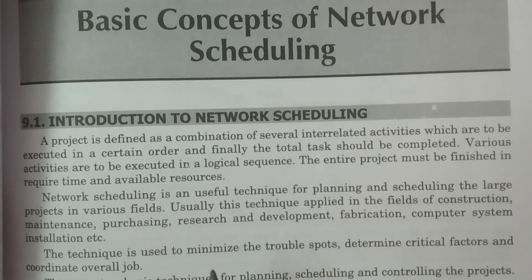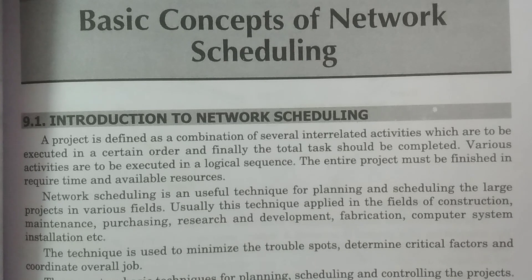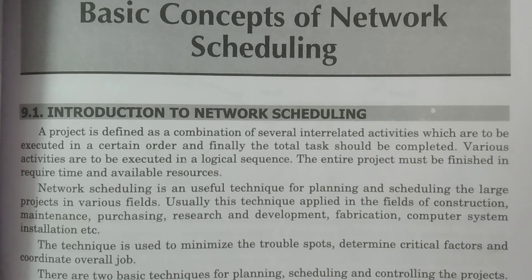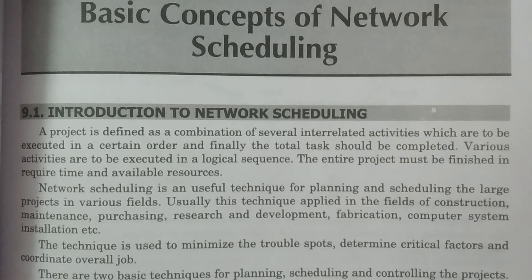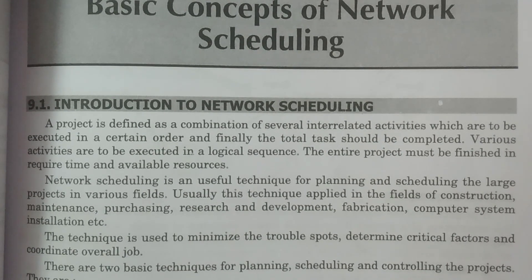For example, if you want to construct a five-floor building, then logically, first of all you have to construct the first floor, then the second floor, then the third floor, and so on. In a logical order, one after another, the work is going to be executed so that the project is completed in a specific minimum time.